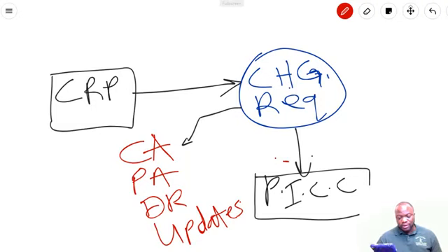It says, any formally controlled project document may be changed as a result of this process. A document that is normally updated as a result of this process is the change log. And then it says the change log is used to document changes that occur during a project. But did you know that a change log is also used to document the final disposition of the change request, whether it's approved, rejected, pending, okay? So that is very important to note.